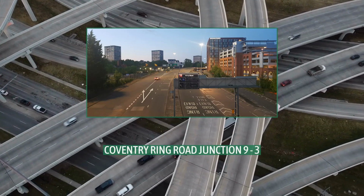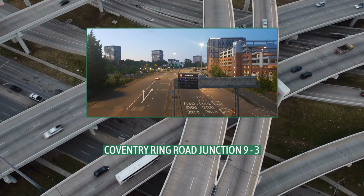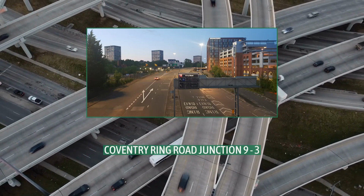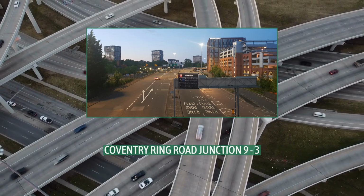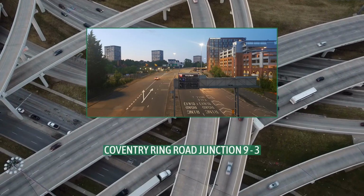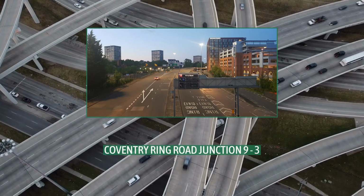The flyover was built using steel girders, a technique not commonly used for bridges at the time, the project benefiting from an ongoing downturn in the construction steel industry, which enabled it to source material more cheaply. Compulsory purchase orders were made in August 1961, with demolition beginning in September 1962, and preparatory work for the flyover commencing by November. Construction was carried out by several companies.